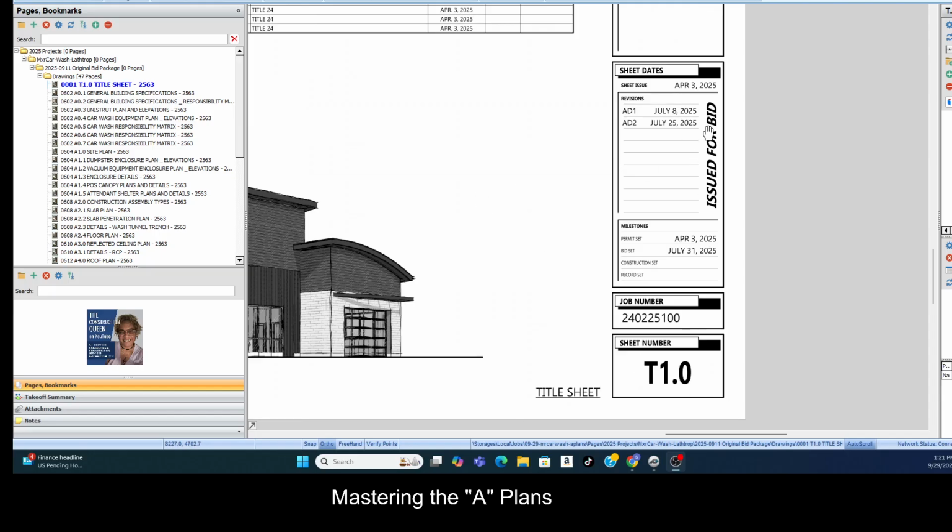In issue for bid, okay, if we don't see anything like this or anything at all, we know that it probably hasn't, there are no permits, it hasn't been a project that is ready to be built. And you always want to look out for that because there are GCs out there that just are fishing for the best number. And if they know you're a good estimator, or you may use an estimator like me, they know they're going to get a verifiable good number.